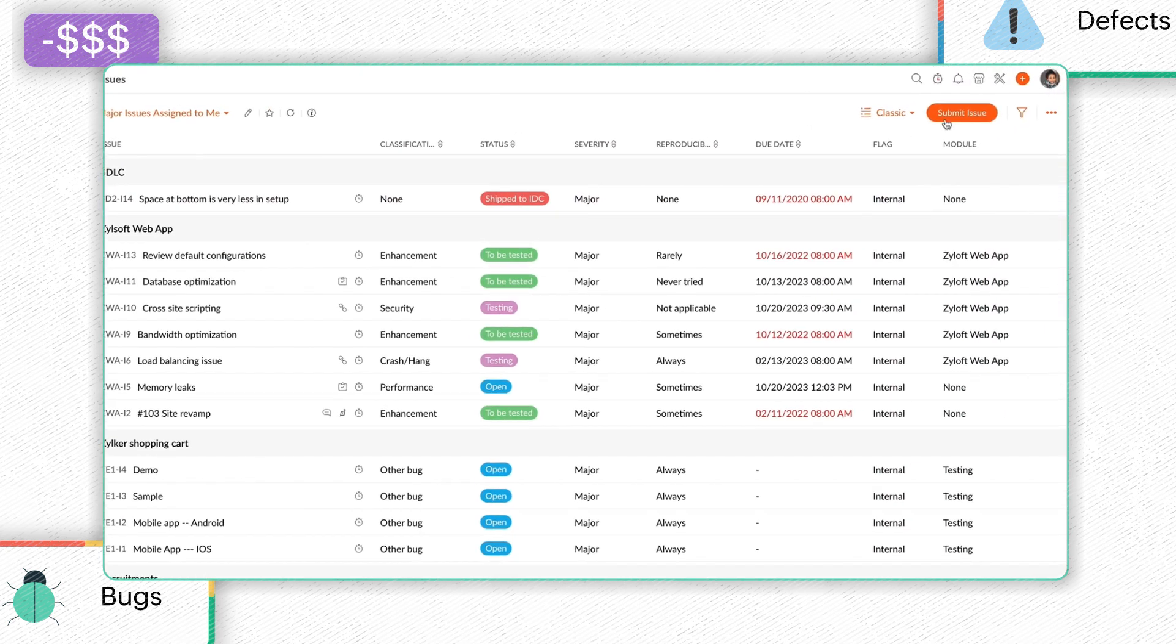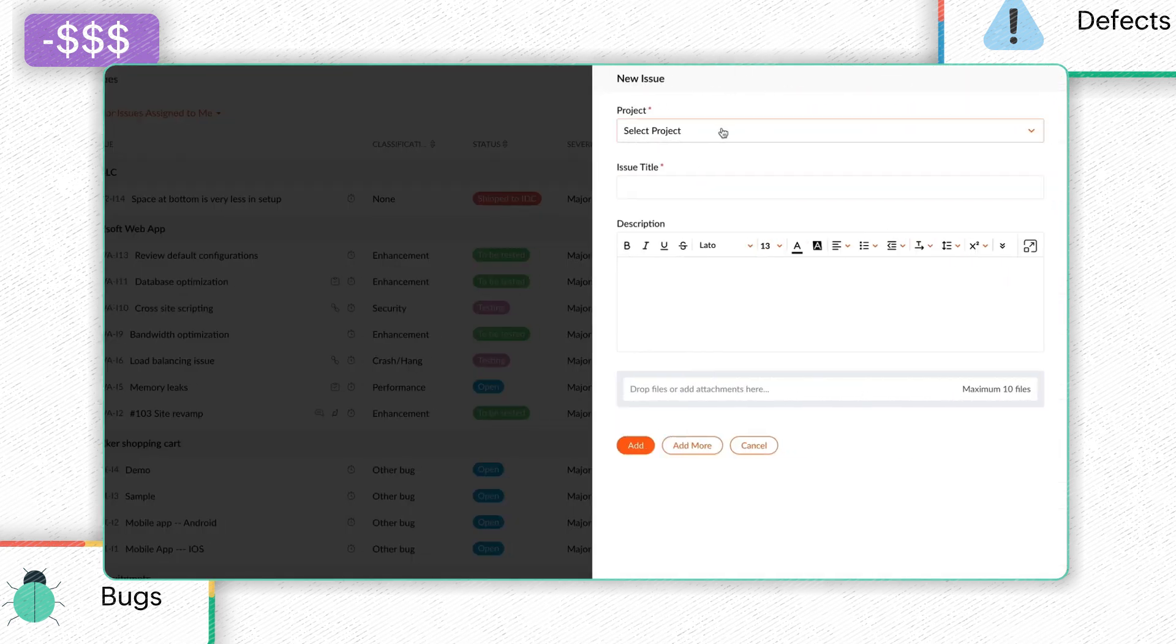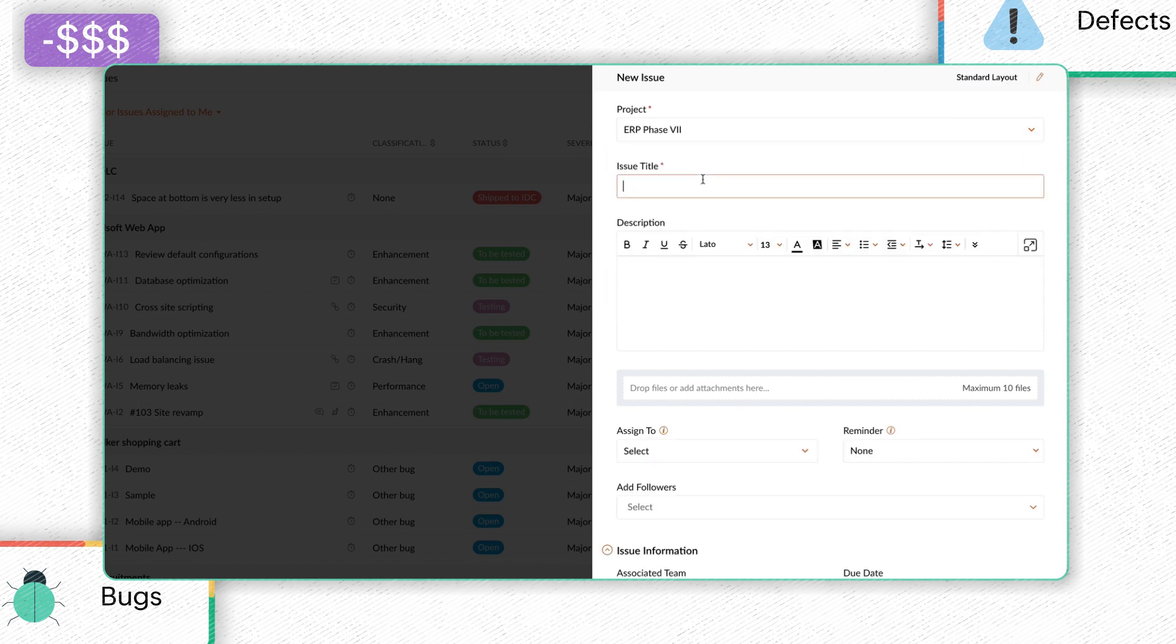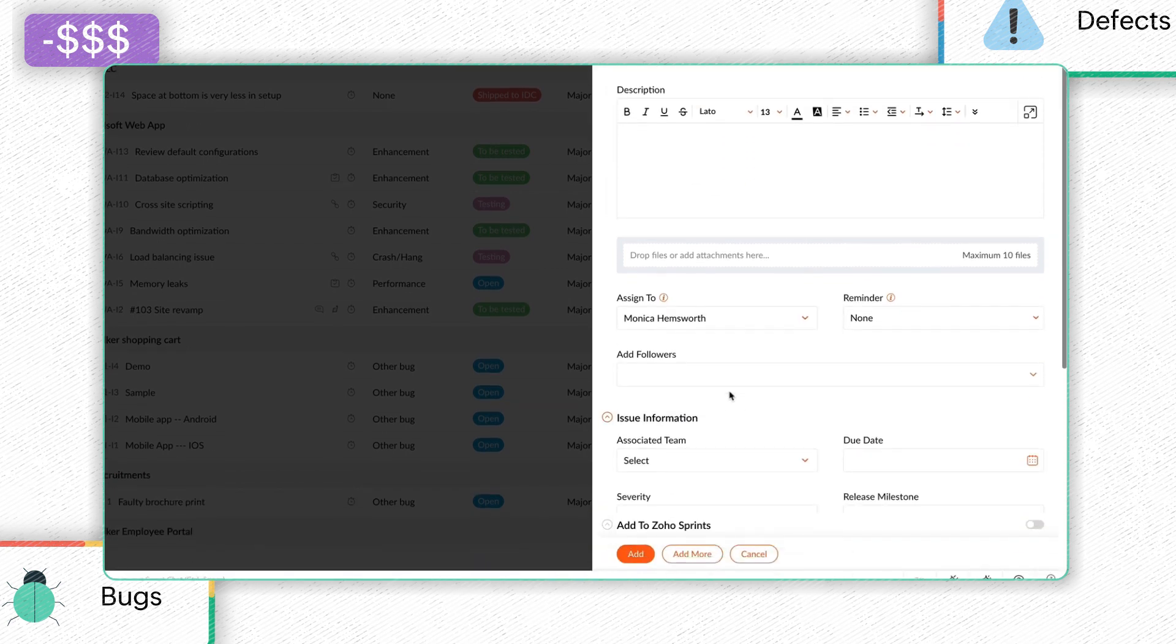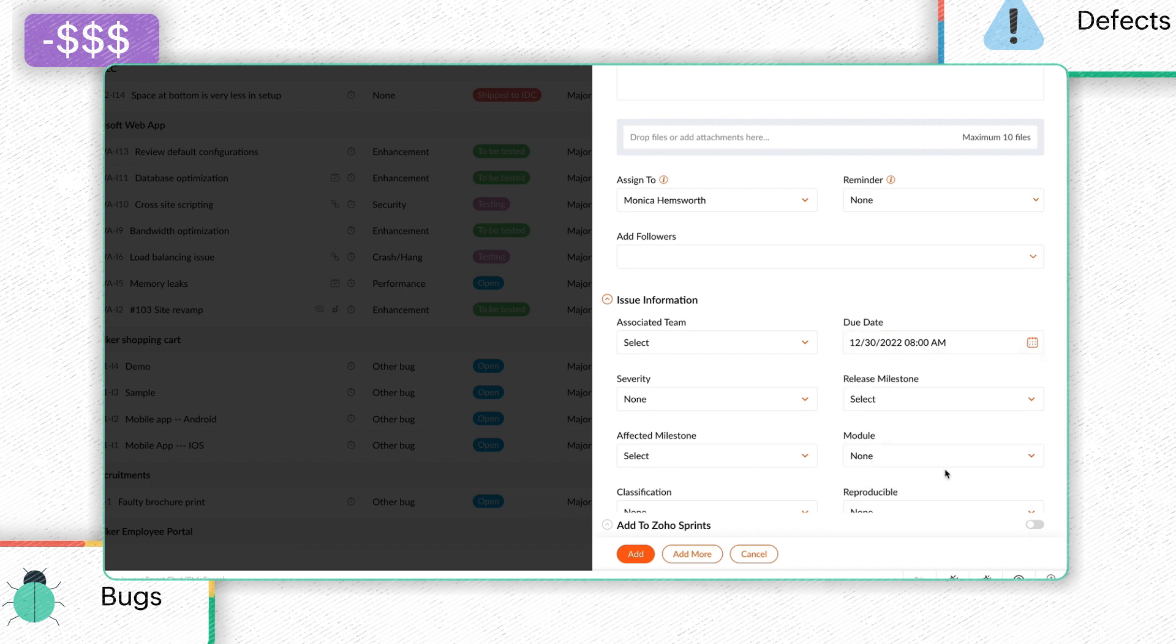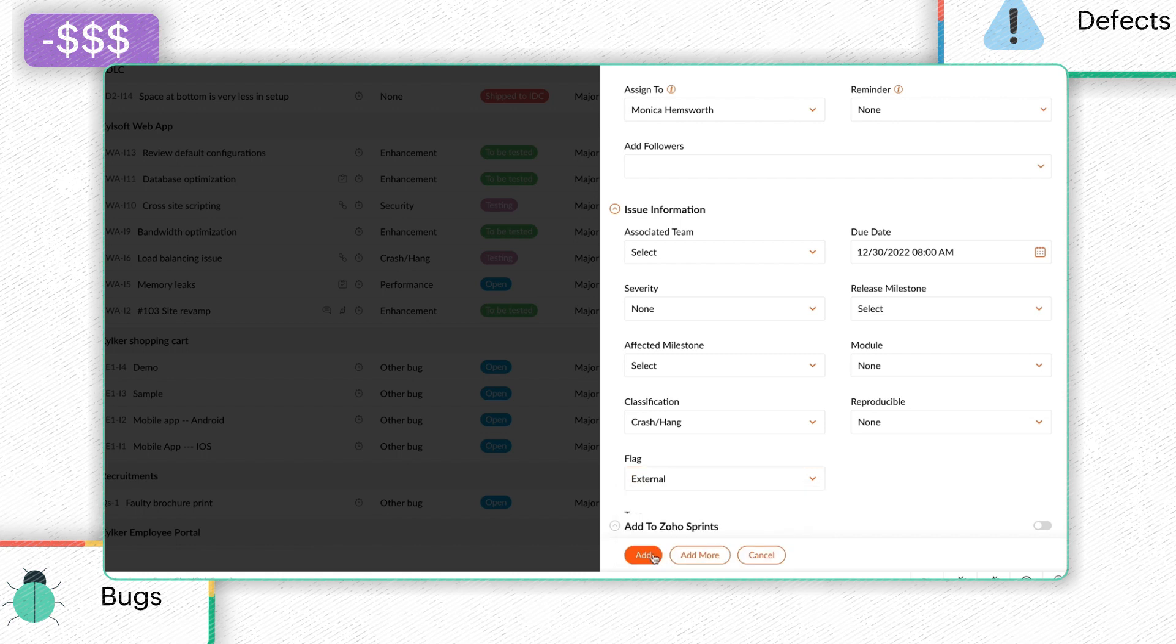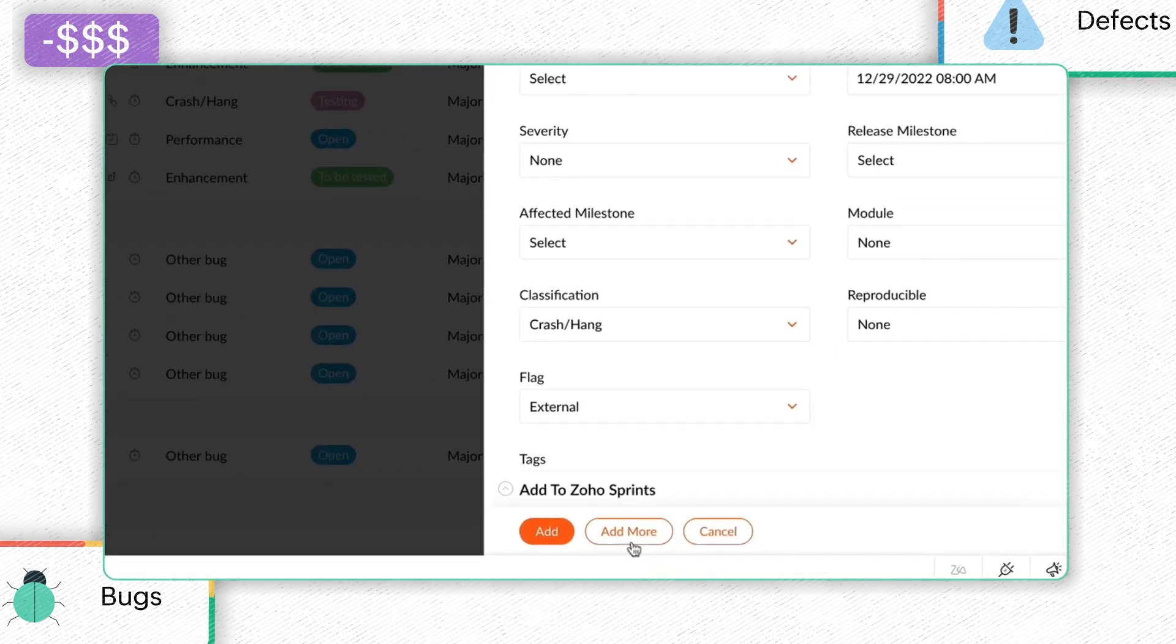Click Submit Issues in the top right corner. Select a project and enter the required information. Click Add. You can click the Add More option to submit more issues.